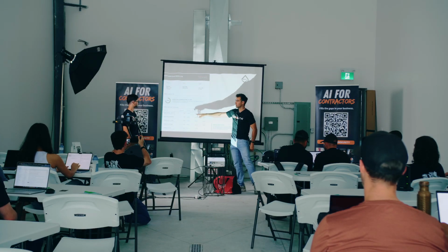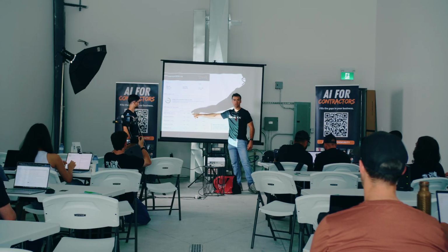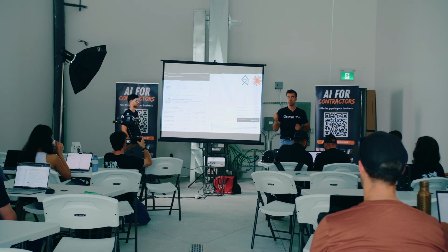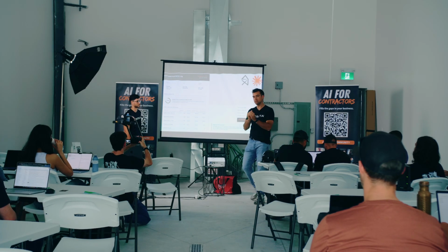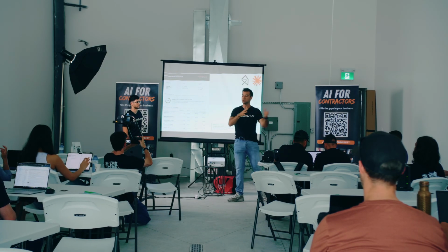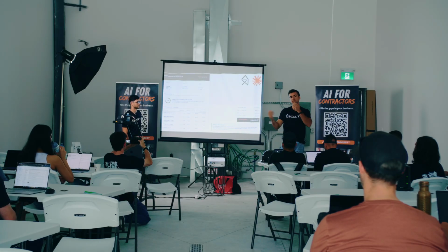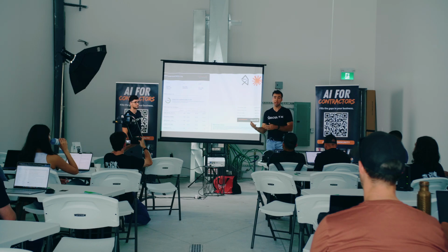Then here, they have rough-in wiring, panel and service installation, lighting rough-ins, and progress complete with the photos attached to it. You can see rough-in wiring, but they've got 12 photos, right? Because it's 2 floors that they're billing for. Their guys on site are taking photos of each different unit, or each different area of the project, and they're attaching those to their progress billing. That way when they send them, the person who's paying has a reference point of what they're paying for.